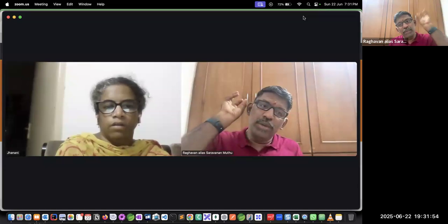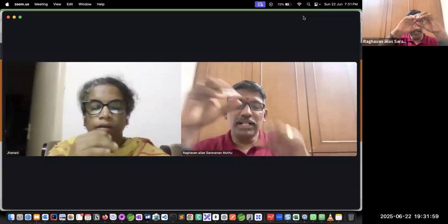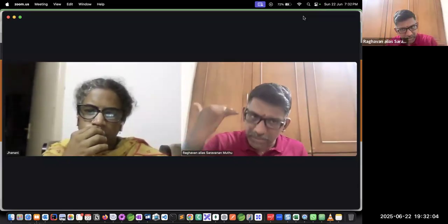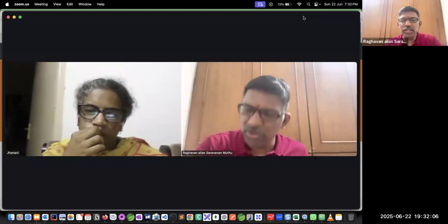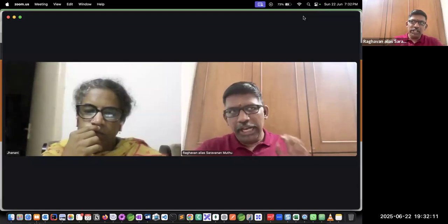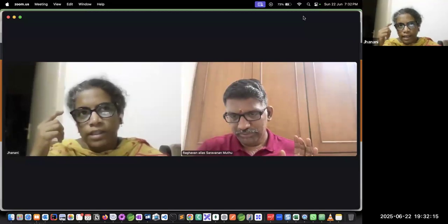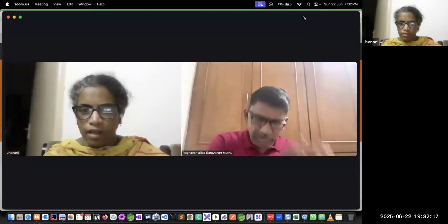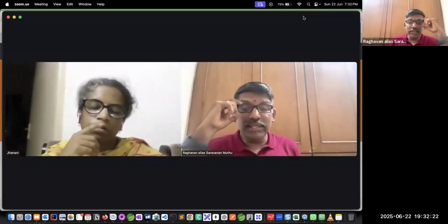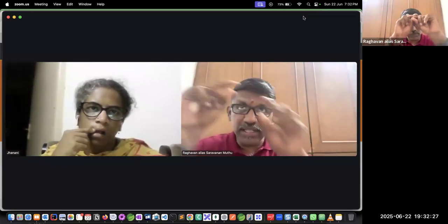All of them can be categorized under an epic. Let's say user profile is an epic, transaction acknowledgement is an epic, under which we can have stories. Miscellaneous transaction, remittance acknowledgement, transaction contribution acknowledgement, they're all stories. We could have multiple stories. I should be able to acknowledge a contribution. So it's epic, then story, then tasks. Epic is a logical grouping of what all we have. Story is a user story, what is testable by a user. What are we delivering as a full story?